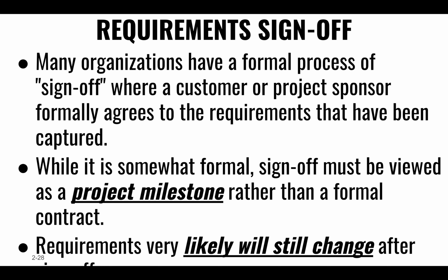As the requirements become more and more mature, we ask the stakeholders to sign off, right? To say, hey, this is the body of requirements that we have gathered. This is our understanding. These are the user models. These are the functional requirements that we understand we're going to be building. I need a signature to say, okay, do you agree that this is what we're going to be building?